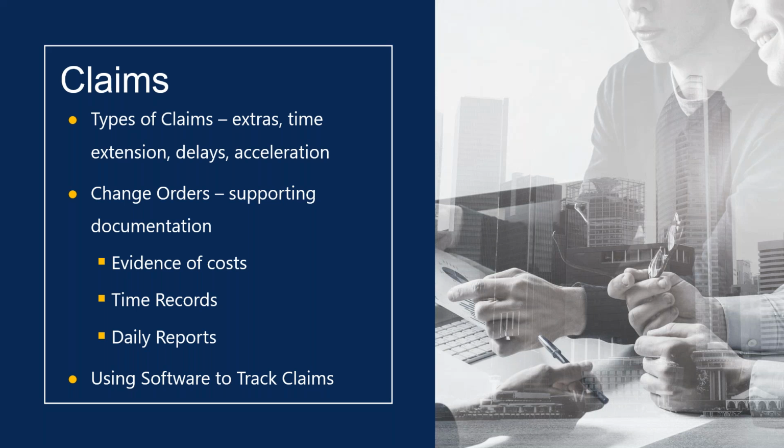Claims. You want to really pay attention to claims when you're on a project. There's a variety of claims that you have to look out for. There's extras, time extensions, delays, and then recently, because of COVID-19, we've seen acceleration claims. So delay claims and acceleration are two sides of the same coin. Acceleration basically means that the owner or your customer has come to you and said, hey, this work that had to be done in a month, you need to do it in 2 weeks. So you guys are going to have to work overtime. You're going to have to work weekends. Well, that's going to cost you more money, right?